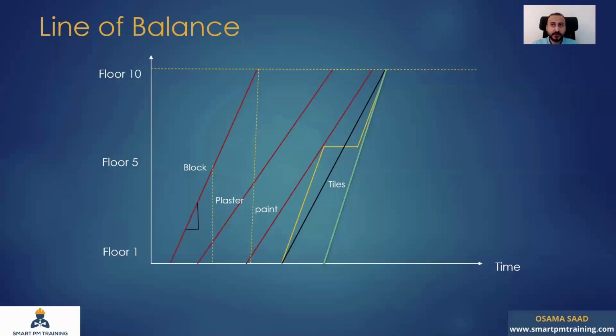So it is not something you want to determine now. It's a given. The 10 masons will take 3 days to complete the floor, right? Because you have 10 masons. So let's say that 10 masons will complete the floor in 3 days. So this is given as well, the execution rate based on the number of resources I have. So if you have this point known, if you have the productivity rates, then you can conclude the start date for the tiles in the project.